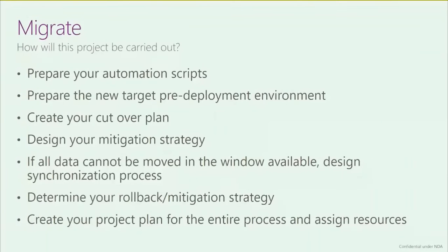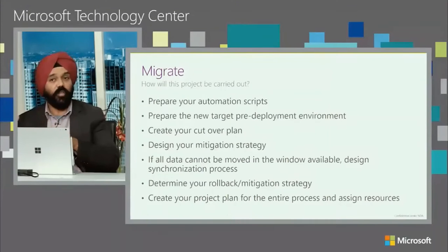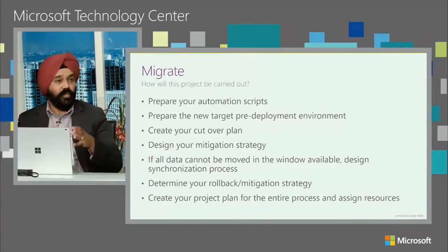And then, again, when we are preparing for migration, you also want to think about, okay, how are you going to actually do the migration? So a lot of the scripts that may be necessary to do the automation, building up your pre-deployment SQL Server environment. What is your cutover plan that is going to be necessary? Mitigation strategy in case something goes wrong, and you want to have a rollback plan, and make sure that you have a very robust project plan because a lot of the different divisions are involved.